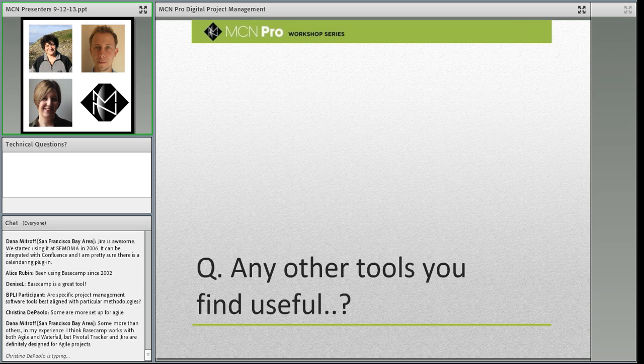And the last one is underestimating what's needed to complete the project, resourcing. People, money, time, the three things. When you're negotiating a project, starting a new project, often a developer or a designer will say, oh yeah, we should be able to do that in 2 weeks. Don't believe them. Just work it through and understand exactly what it is you're asking and make sure that there's enough time for them. And the same with the budget and